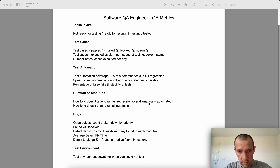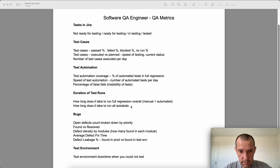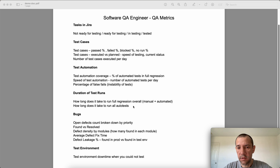Another useful metric is the duration of test runs — how long it takes to run full regression overall, including both manual and automated. This gives you an idea of how many days or hours you'll need to spend at the end of the sprint. It matters because if it takes, for example, three hours to run all your automated tests, then you can run them daily.